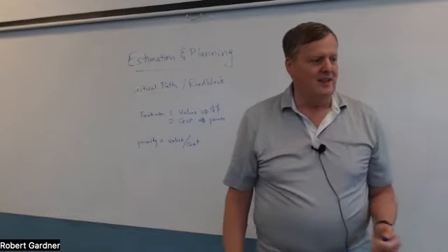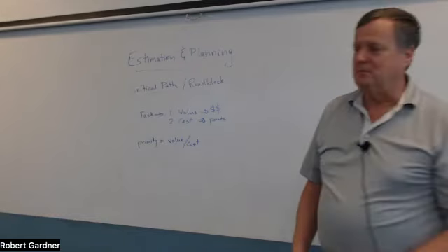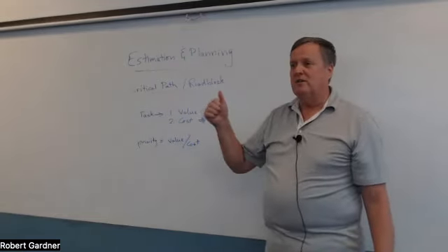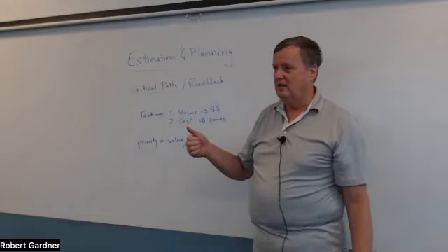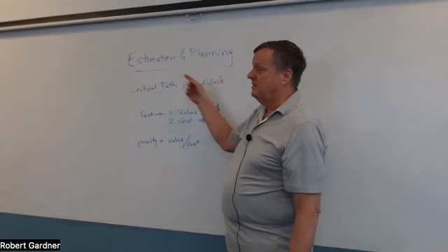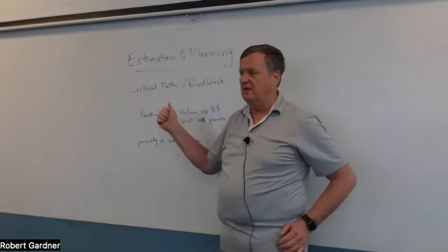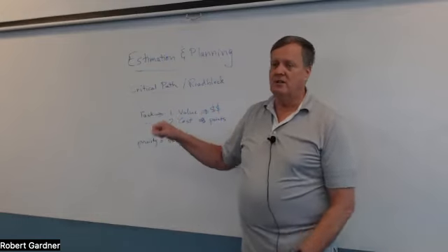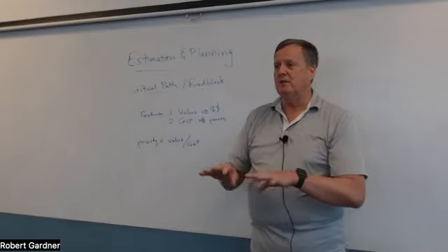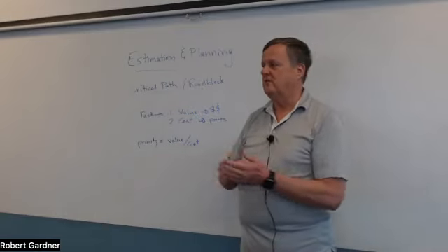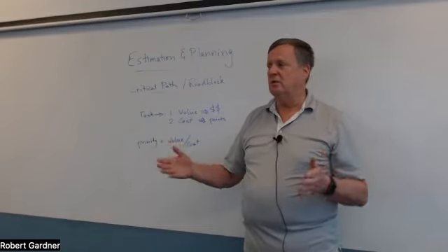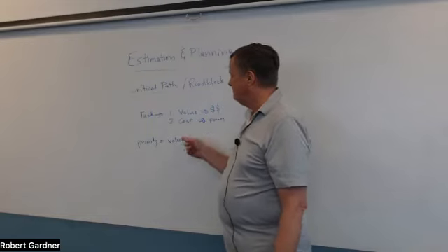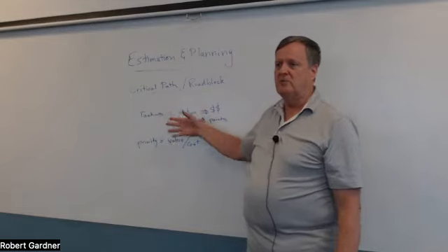So anyway, that is all I really want to say about the whole estimation and planning problem. I just want to wrap up with: estimating how long it's going to take to do things is a challenge. It's very, very hard. But by using the comparison approach, you can usually get a handle on what it is. But that requires you to keep logs and to keep track of what you've done and how long it actually took. Not how much time you spent in front of the computer, but how much calendar time. Because calendar time takes into account interruptions and meetings and everything else that happens. So you've got calendar time in your log, and then you can use that to build your baseline.